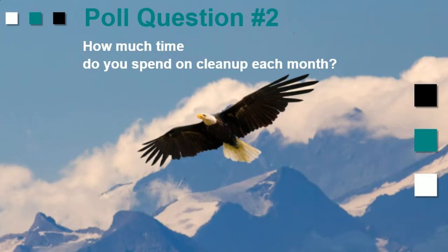Okay, because we've got contractors who like to use P6 for resources, for costing, for multi-currency costing. We've got a lot of great things that we've done on those fronts, and if those things are interesting to you, jumping in on our P6 calculator webinar could be good. But you don't necessarily want to share that. If you're on a lump sum contract, the client doesn't necessarily need to see all that. So rather than getting an export and cleaning it up in XER, which is violating some of your licensing, this could be a fantastic way to do it.